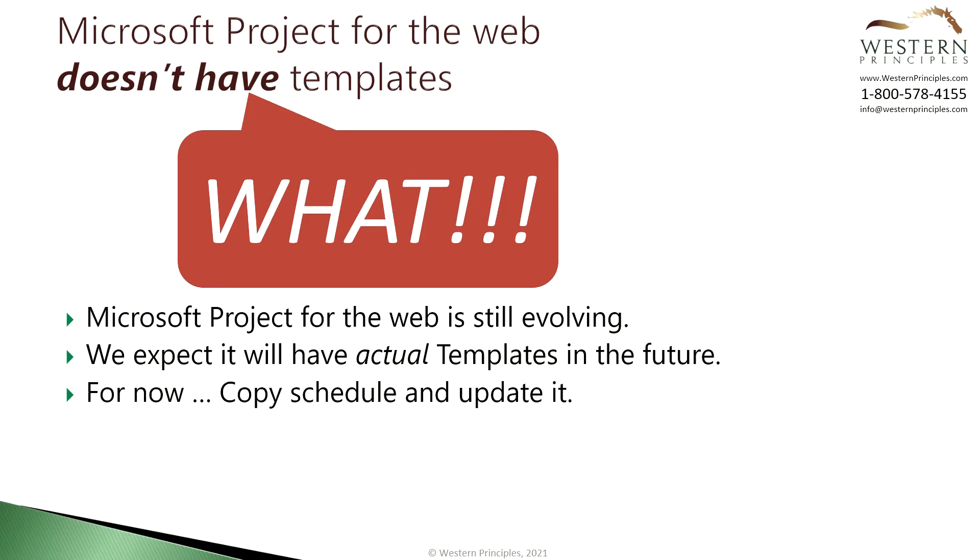The copy function will copy your schedule's work breakdown structure, tasks, durations and dependencies. It won't bring over your resources or progress so it gives you a good starting place for creating a new project.